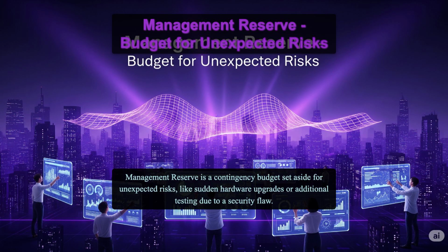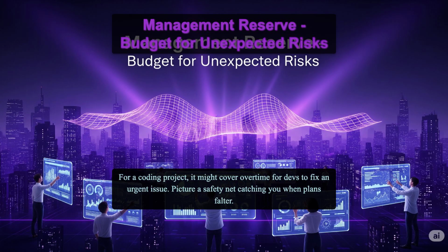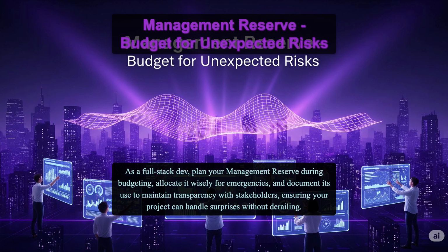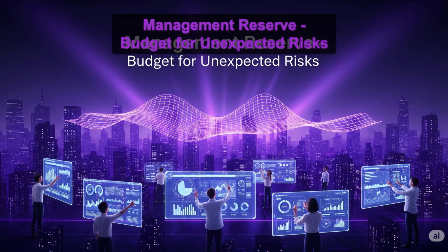Management reserve is a contingency budget set aside for unexpected risks, like sudden hardware upgrades or additional testing due to a security flaw. For a coding project, it might cover overtime for devs to fix an urgent issue. Picture a safety net catching you when plans falter. As a full-stack dev, plan your management reserve during budgeting, allocate it wisely for emergencies, and document its use to maintain transparency with stakeholders, ensuring your project can handle surprises without derailing.